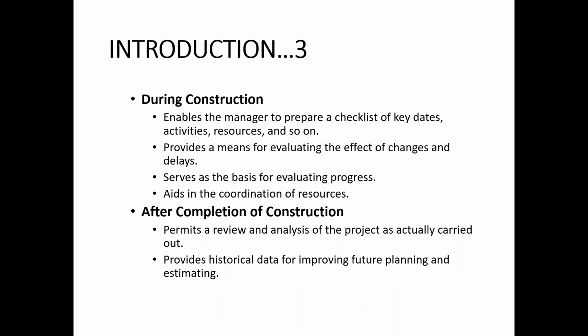During that construction project, some of the work takes place on the construction, and then that work is compared with what was originally planned. So we can evaluate the progress. What has been done and what was supposed to be done, these two works are compared to evaluate the progress. And it also aids in the coordination of resources.